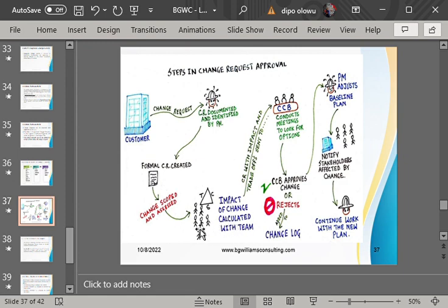So if at this point the project manager discovers that it will have no impact, then the project manager has the right to say, okay, my team, execute. But if at this point the project manager discovers that, well, it has impact, or it will increase cost by 5 million. This little change, now we have to go and get license for it. It will increase the cost by 5 million. Are you saying the project manager and his team will bring the money, that 5 million? No, which means it will increase cost. And they check, it will make the time for this project, instead of 6 weeks, it will make it 8 weeks. What are we now going to tell the owner of the project?